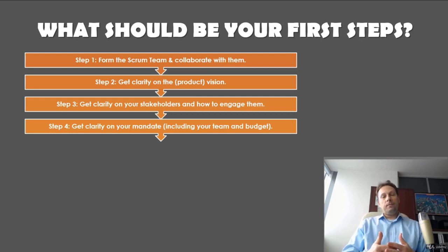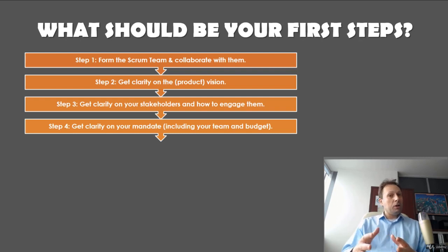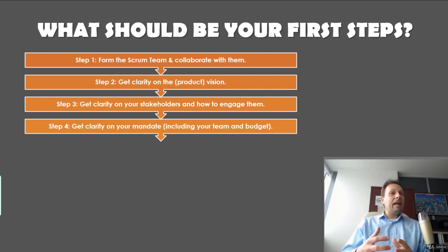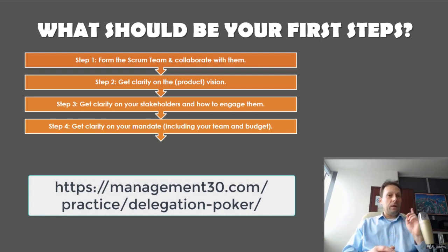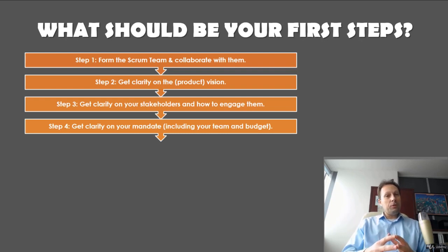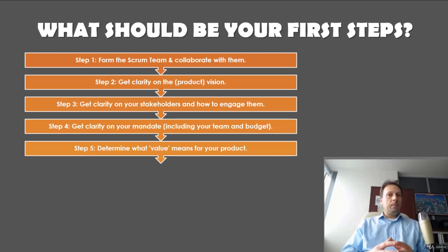Step four: get clarity on your mandate, including your team and budget. Now that you know your most important stakeholders, involve them to define your mandate. You may be appointed by a sponsor, management, or the business — but what are your responsibilities and what is the mandate that comes with them? One tool that can help is Delegation Poker and Delegation Board. Use Delegation Poker to clarify who is responsible for what and to what level — it encourages employee engagement through controlled self-organization and clarifies decision-making.